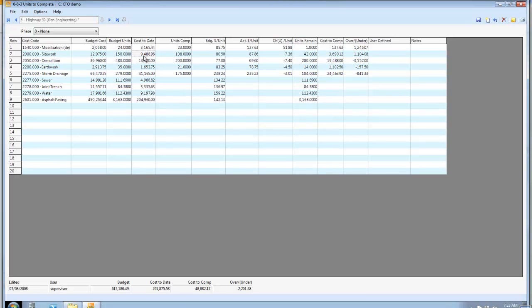And this is the cost that's gone through the system, whether it be materials, subcontract, labor with fully burdened labor going through there. And then I only want one thing. I want the guy in the field to tell me how many have you got done as at the end of Friday. And I'm just going to make it a different number here.